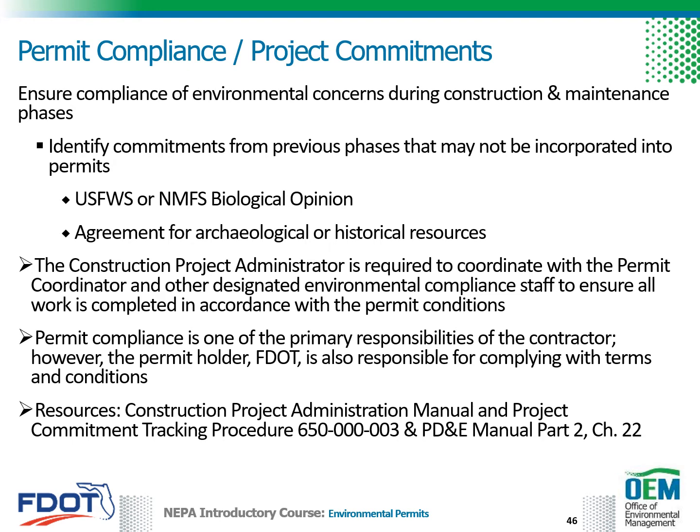Examples include a U.S. Fish and Wildlife Service or National Marine Fisheries Service biological opinion, an agreement for archaeological or historical resources, and PD&E commitments. The construction project administrator is required to coordinate with the permit coordinator and other designated environmental compliance staff to ensure all work is completed in accordance with the permit conditions.